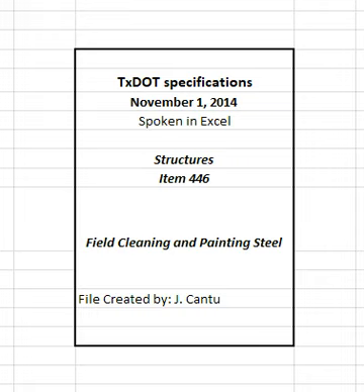Cleaning and painting existing structures includes painting of railing and piling unless otherwise shown on the plans. This price is full compensation for paint, cleaning, spot painting, and painting, removal of vegetative obstructions, containment systems, traffic protection and scaffolding, disposal of waste, and materials, equipment, labor, tools, and incidentals.